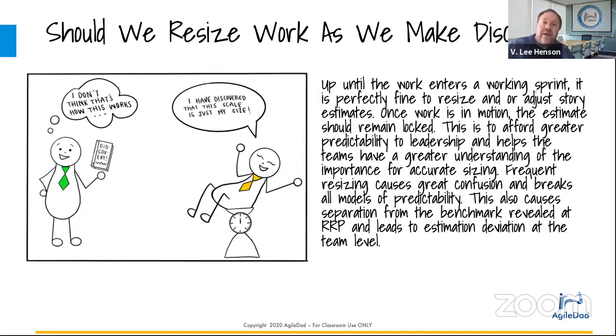And the reason why is, if you have to create a spike, I'm all for that. I think it's a great idea. Oh no, we didn't think of this. Let's go in and create a spike. What that does is it sets an alert, one, that the product owner needs to do a better job of vetting out and doing acceptance criteria and things of that nature so that we can better understand the stories coming into the sprint. And two, it teaches the team the importance of accountability and making sure they understand the scope of the work before they start. Now, that's not to say that a spike's never going to come up.